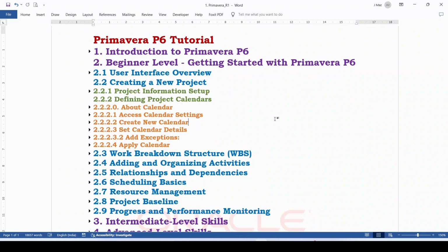Now, a question may be raised in your mind. I have already told in the previous video that before creation of a project, you have to create a calendar. This is basically a good practice. However, during installation, Primavera creates some calendars by default within the database. When we created a new project during our tutorial video, the already provided calendar was assigned in the created project.